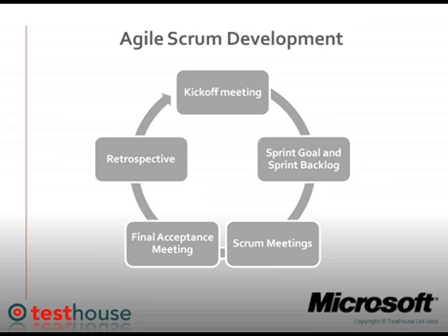So on this PowerPoint we can see that there's a process here, there's separate phases. So we start off at the top there with the kick-off meeting. The goal of this meeting is to get everybody on the team together and review the product backlog that needs to be delivered. We move on to the elaboration, which is a list of work that needs to be done for that particular sprint. So while the team is collectively creating the sprint backlog, stories need to be broken down into either sub-stories or smaller tasks. And during this collective team exercise,